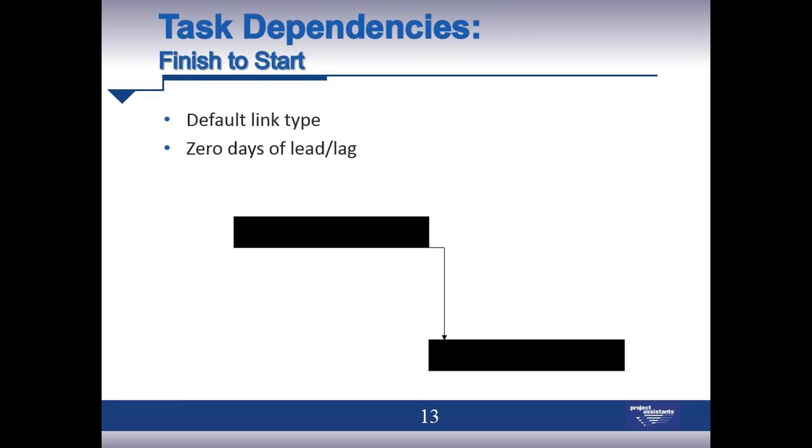All right, just a few key techniques that I think are really important when you're building a plan. I mentioned earlier task dependencies. In Microsoft Project, there's a few variations of those. Here we're showing a straight dependency with 0 lead or 0 lag, meaning that I could start task 2 when task 1 is complete. This is probably the most common type of dependency that you utilize in MS Project.